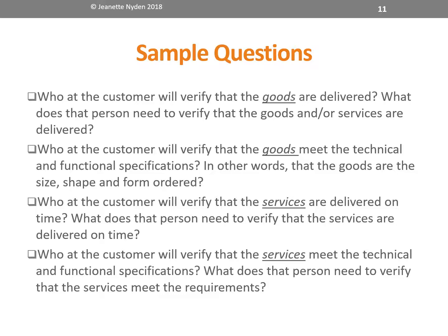Now, guys, this isn't approval. This isn't like, oh yeah, phase 1 is done. It means phase 1 is accepted per the criteria. We are now paying for that work, and we agree that it is in fact conforming. That is what acceptance means.